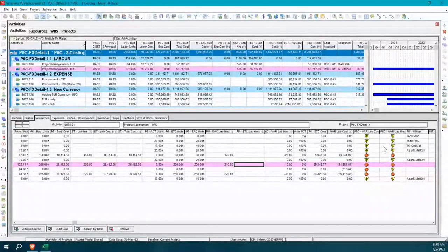And it will also impact your productivity calculations that you're seeing based on the percent completes achieved today. So you've got to keep the updating simple. You've got to have the calculator do most of the heavy lifting, and you need a lot of flagging so you can see what's going on. So that's really some of the crux of what you want to do when you're implementing cost components. And integrate, if you've got integration capability, that's a good one to use as well.